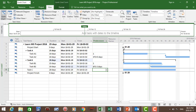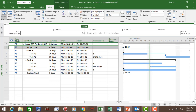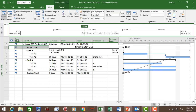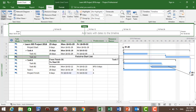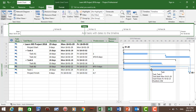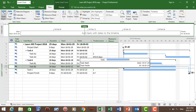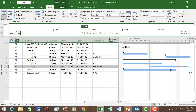Task C will also start at the beginning of the project. Now let's close off our tasks: A2 to Project Finish, B2 to Project Finish, and Task C to Project Finish. So now we've pulled the project schedule from the project start to the project end.